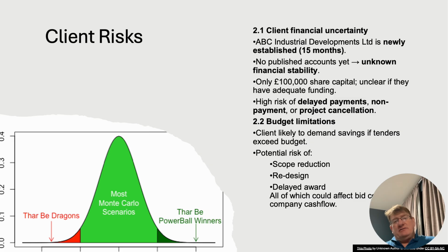With regards to that, also obviously the type of procurement, I should call it rather than tender, the type of procurement that you use also adds risk. Traditional procurement methods spread the risk 50-50, 60-40 between the contractor and the client. Design and build, though, puts most of the risk, or a lot of the risk, on the contractor, because they're designing it and building it.